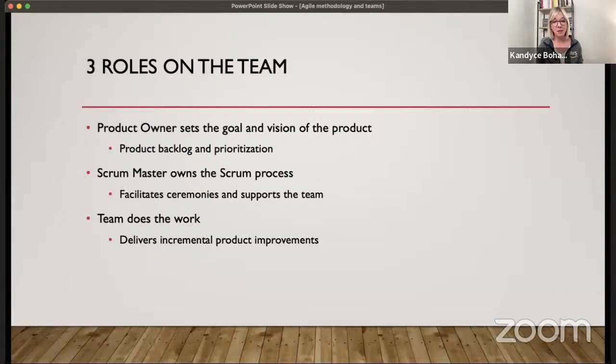So it might be, as a product owner, I want a product backlog that is prioritized so that my team knows what to do. In a user story, we always talk about who it is, what they want, and why they want it. That helps the team really understand what's happening so that they can implement it in whichever way they think is the right way to do it.